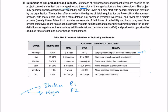So for prioritizing risks in your list, you'll have to do a qualitative risk analysis, and then you'll have to do a quantitative risk analysis. Qualitative analysis is subjective, and quantitative is dollar value.